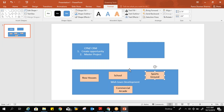Using the same Wishtown example: when the government sends a request for quotation, you first create a master project and prepare a bidding document based on it. The bid document is prepared in Analysis Office — an Excel-like sheet — and sent to the customer. Once accepted, you change the status and move forward with planning. This illustrates how we flow through the different processes in the system.